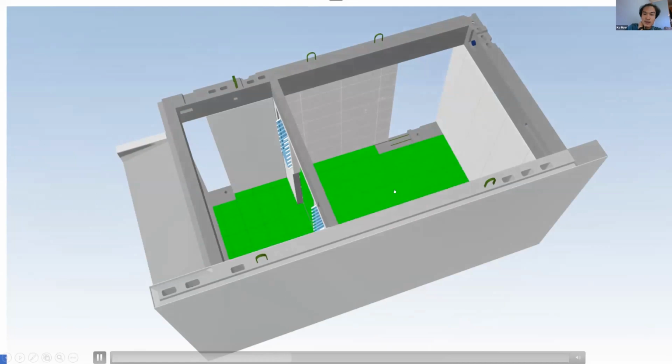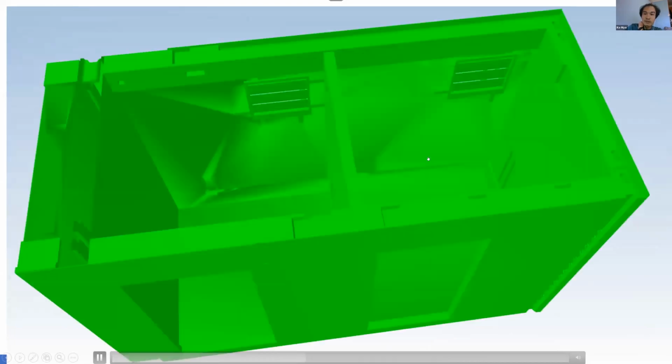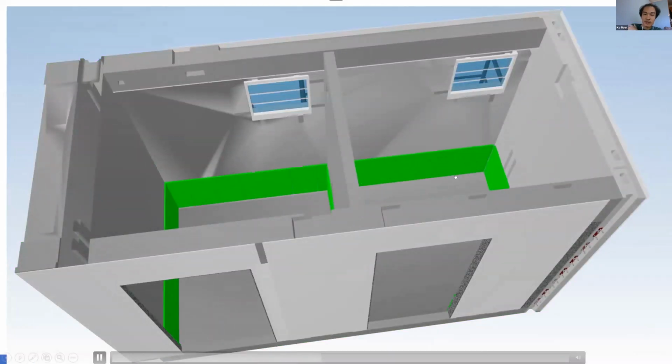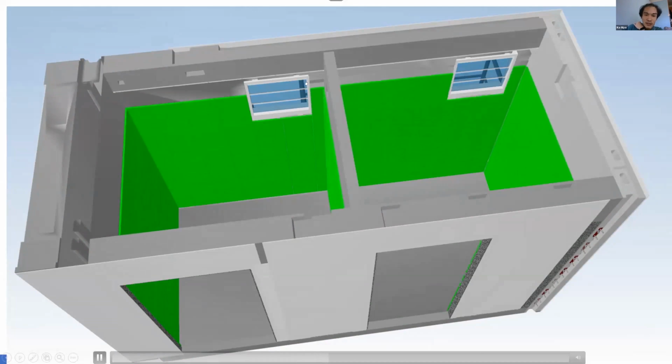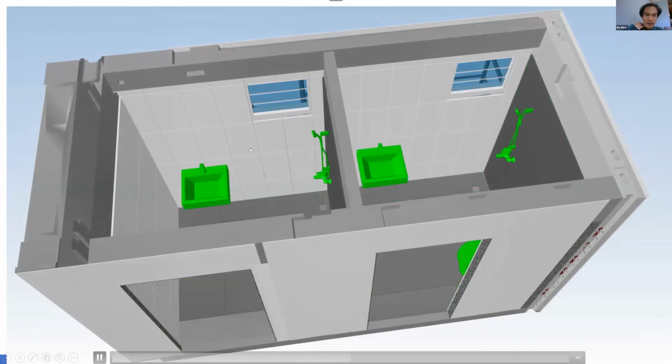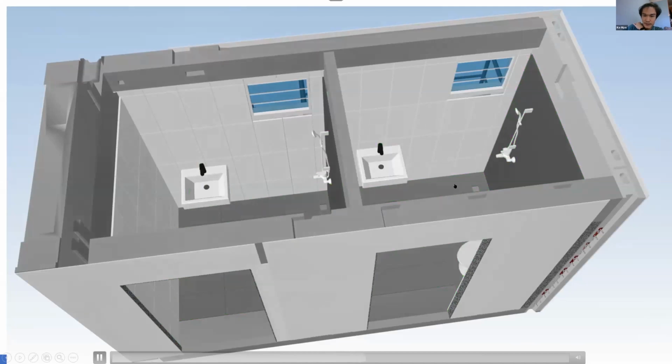So those tiling production drawings are supposed to be out even before PVC starts, so all the penetrations and floor tile locations can be determined, or even window alignment. The tiling is all correct. So yeah, then those equipment need to be installed.